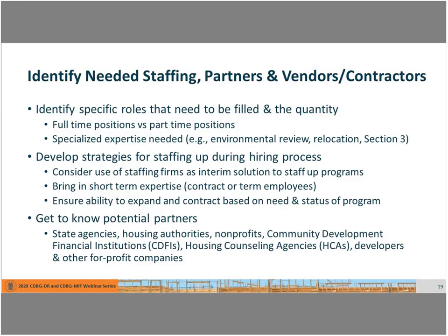So it's important to anticipate that and write both your job descriptions and your contracts and your procurements in a way that reflect that, so that you're not shortchanging in terms of underestimating how long you may need different types of folks around to help with certain phases of the project, but also not having contracts that run longer than what you may in fact need, and then you're stuck with some sort of obligation for payments or something like that over time. So really important to think through those different phases and chart those out.